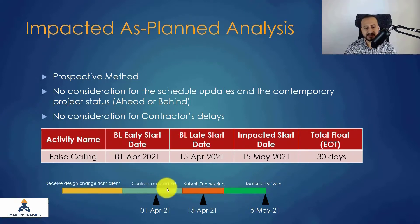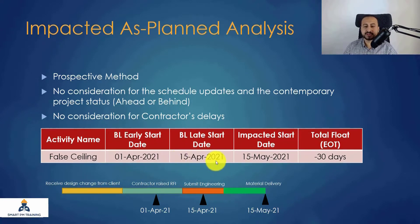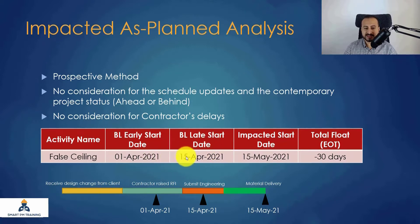For the Impacted as Planned analysis, let's say we have one activity: the false ceiling. The baseline early start date is April 1, 2021. The baseline late start date is April 15, 2021. The impacted start date is May 15, 2021. I have 15 days of float — that is why the late start date is April 15.